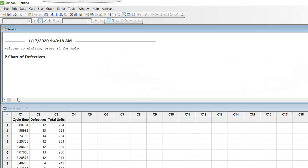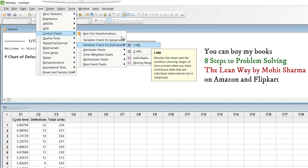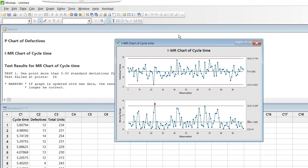I have continuous data in column C1 which is cycle time data. To check if it is statistically in control, go to Stat > Control Charts > Variable Charts for Individuals > IMR Chart, click OK, enter cycle time in the variables column, and click OK. This is the control chart you get — all data points lie within the two red control limit lines, meaning the process is in statistical control. Any points going outside those limits means the process is not in control. Keep the process in the control phase for two to three months before handing it over to operations.